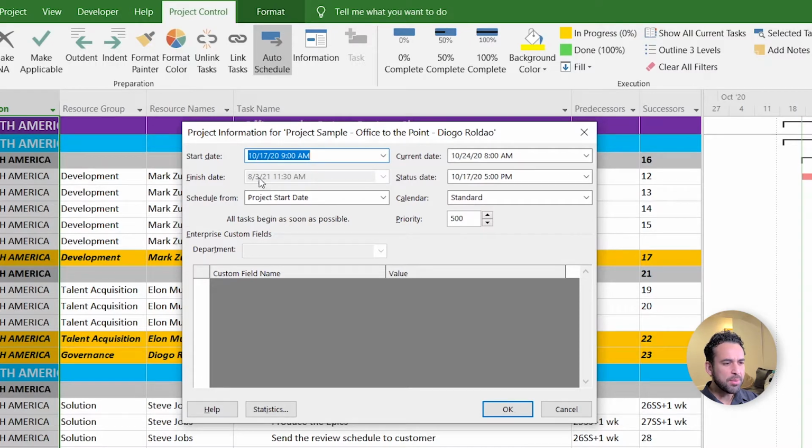Currently, it's also automatically defined unless you change it. Its current hour will always be 8 AM. If you are tracking an hourly project like a deployment, you may want to come back here more often in order to move the today marker on the timeline view to the current hour. As it is by default static on 8 AM every day, you may want to move to 9, 10, 11, 12 and make your view more aligned to the reality.